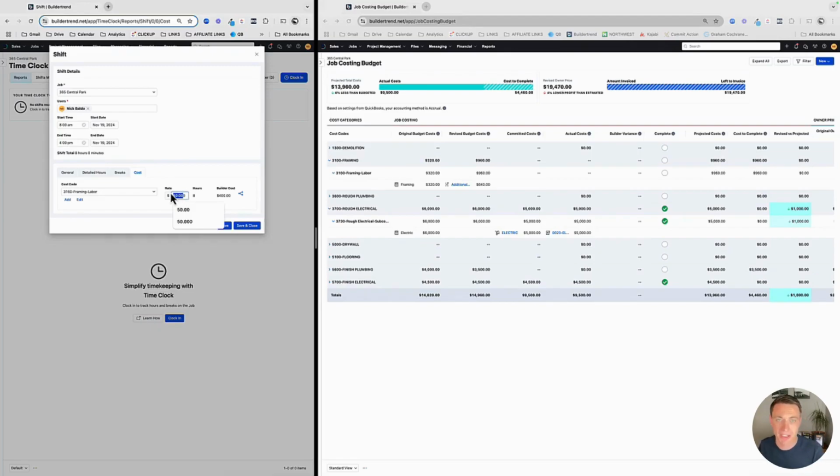I used to be really specific and say, well, an employee cost me 25 bucks an hour. I had 9% for taxes, 20% for workers' comp, 5% for admin, and now this employee cost me $42.36. I used to be really specific with that. And then I got to the point where it's really hard for me to manage that change. I'm going to round it up a little bit to be a round number.